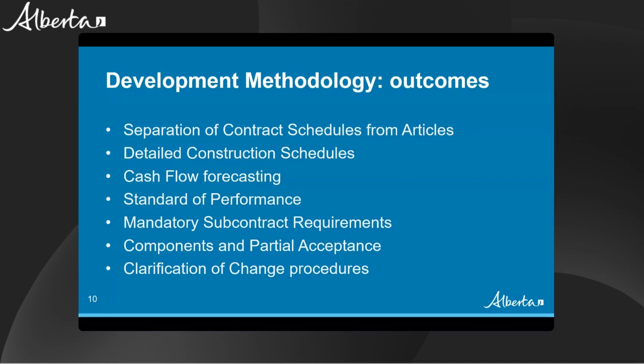The separation of contract schedules allows key terms that may change from time to time and from project to project, such as cost escalation, to be moved into the schedules and kept apart from other key terms that will remain the same for all projects as contained in the articles. This allows more transparency for project proponents to be able to more easily locate and review important project details like payment procedures, insurance, and bonding requirements and specifications.